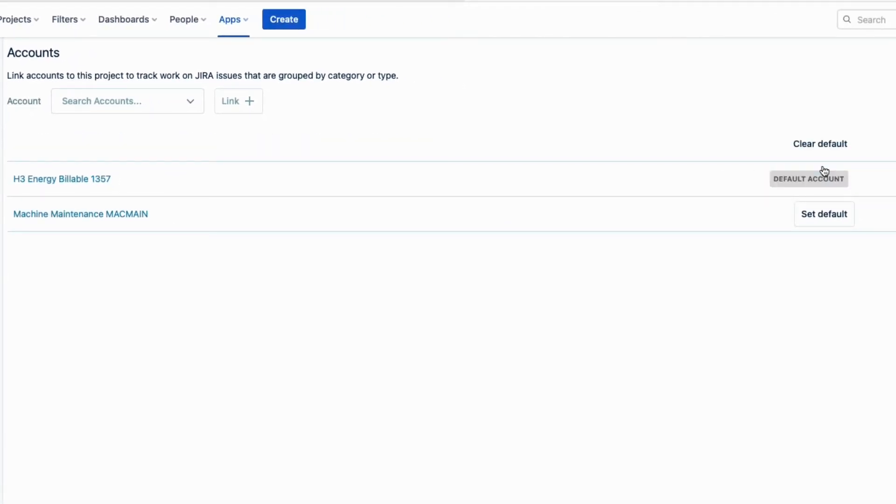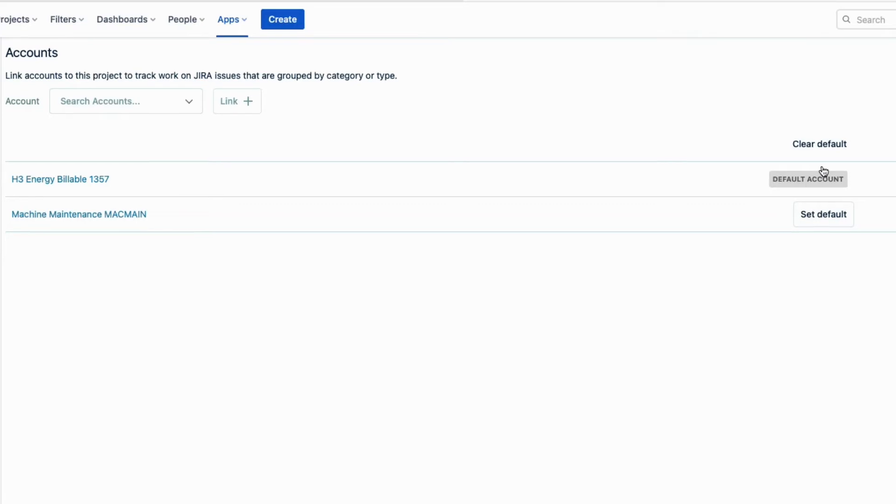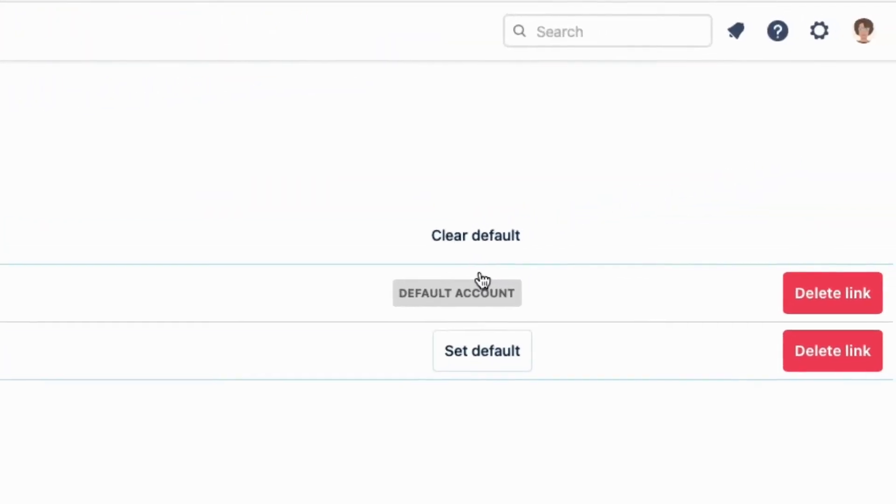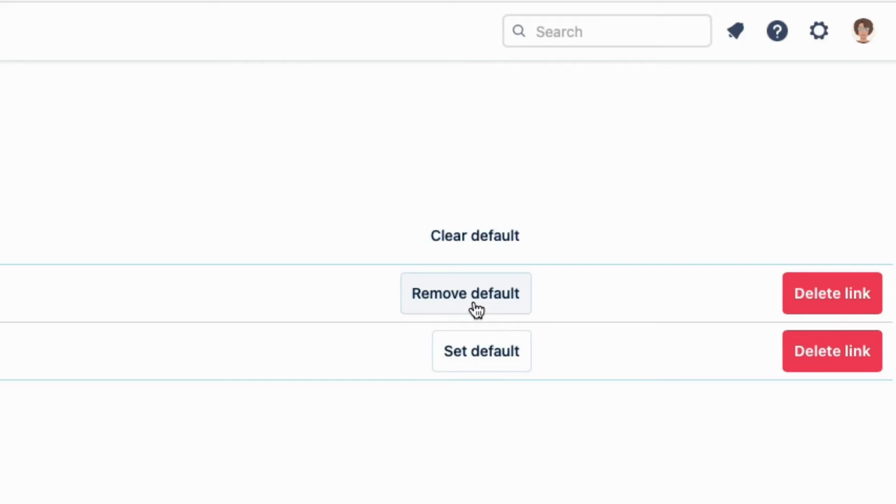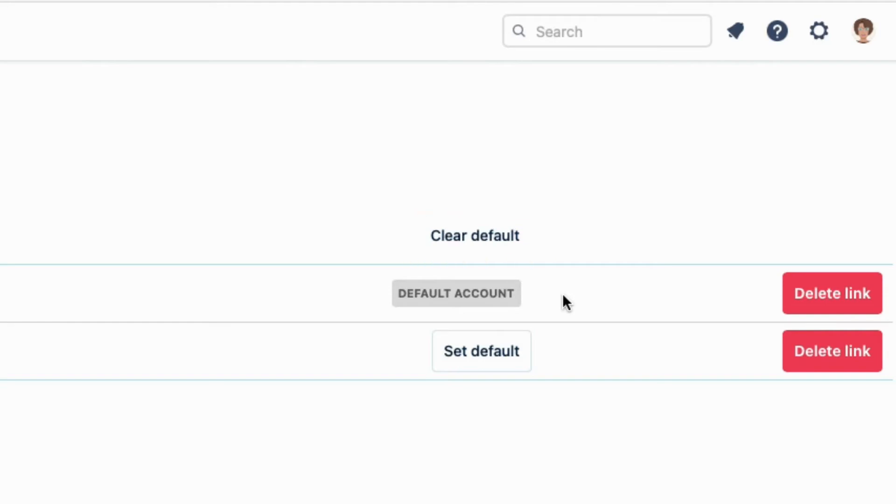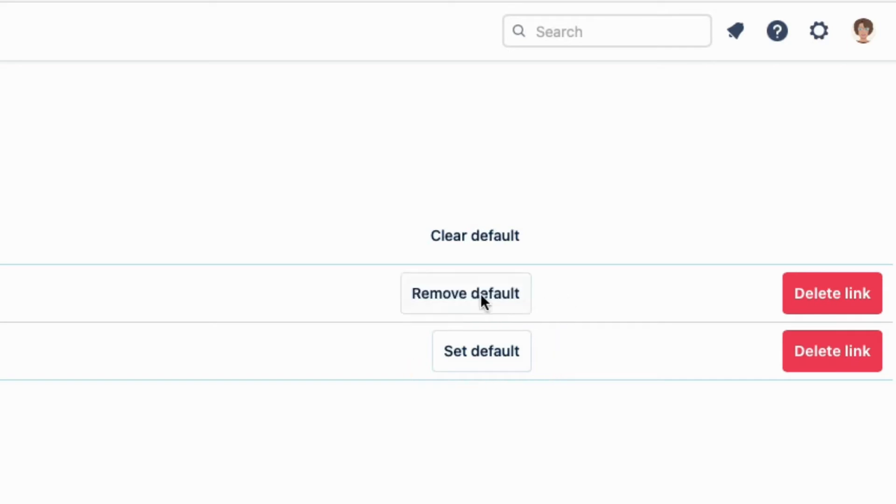Only one account at a time can be the default. Notice that I can click remove default if I don't want this account to be the default anymore, or I can click clear default so that there are no default accounts at all, or I can simply click set default for another account, and then it switches to become the default.